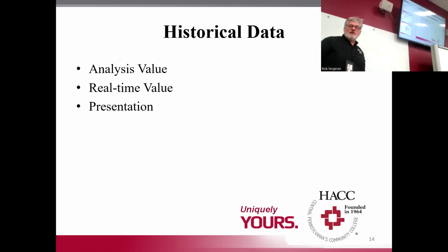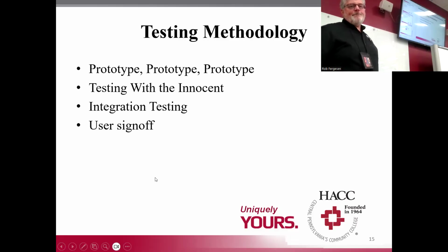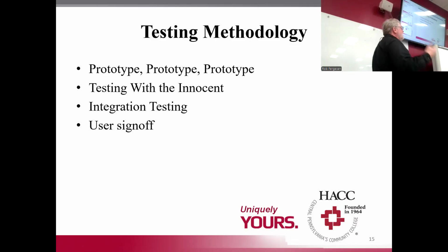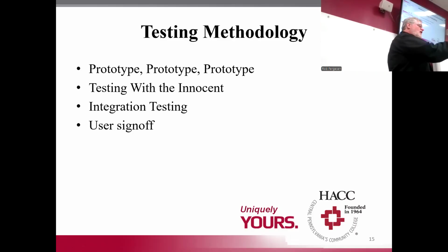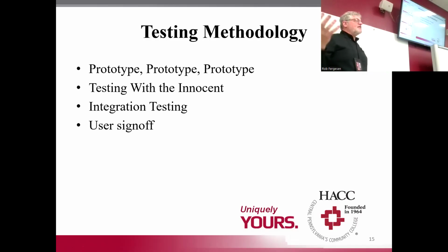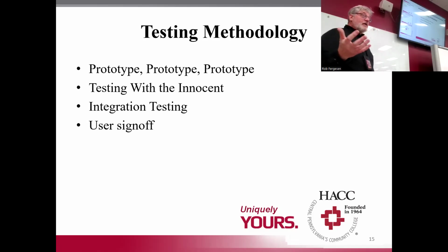Last but not least, I want to talk about testing methodology. I talked about it at the beginning, and we're going to talk about it at the end. Anything you build has to be fully tested. Any change you make, you may not only have to test the area where you specifically made that change, but you might find that you have to do some regression testing and go back and retest some of the old areas again. So you've got to test your HMI. You've got to test it with operators who are going to make traditional operator mistakes. There's no such thing as a dummy-proof system.